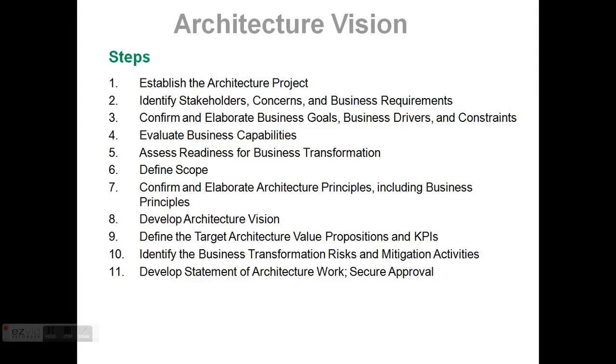The important things about the scoping, there are a few points that I wanted to add, are particularly defined as the breadth of coverage of the enterprise, the level of details required, the partitioning characteristics of the architecture, the specific architectural domains to be covered, the context of the time period aimed at, plus the number of content of any immediate time period, the architectural assets to be leveraged or considered for use for the organizational enterprise continuum are the most important components of scoping, which is the point 6.